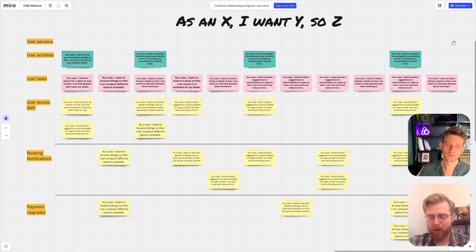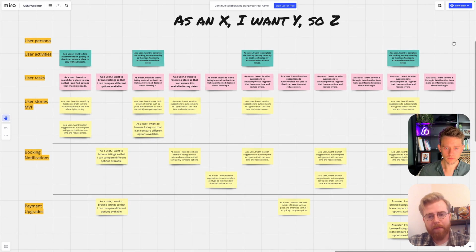Just look how horrible this looks. You don't need to be writing full user story syntax for every story title. It's important to think about stories this way. That's how it came about, sure. But your titles need to be a short, succinct description of the work at hand, ideally from the customer's perspective, right? So when we write out the full syntax this way, it might help us educate our audience or the stakeholders that we're describing it to. But look how unclear this makes the map look. It makes it really difficult for us to have conversations about the work.